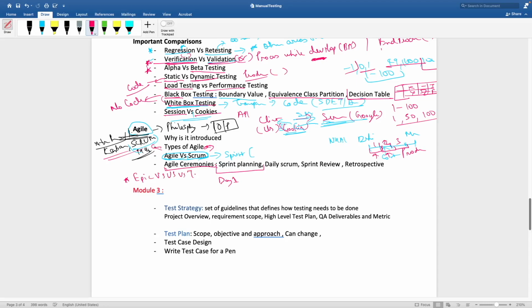Okay, so an epic is something which does not fit into a single sprint. So we have to break the epic into working user stories. And then we make tasks to implement user stories, and user stories are completed to complete an epic. So we have to understand it this way: an epic contains user stories and a user story contains tasks. Okay, this is the difference between them.